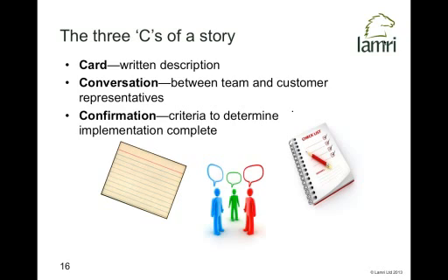And then lastly, another series of conversations happens at the point of delivery, at the point of, okay, I've got to do this story now about posting a CV. What does this actually mean? And potentially at that point, we come up with little user interface sketches, notes on what it actually needs to do, and specifically what the test criteria are that will pass. Those test criteria will then become the seeds and the core of the actual unit tests that I'll write to test that we've done what we said we would do.